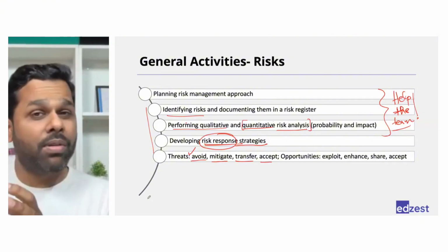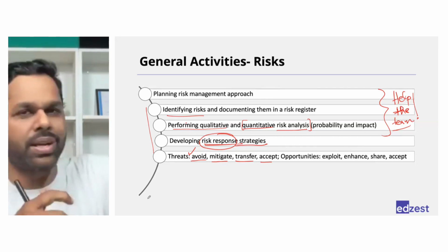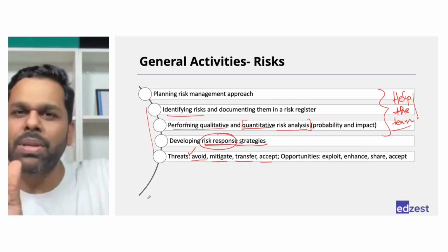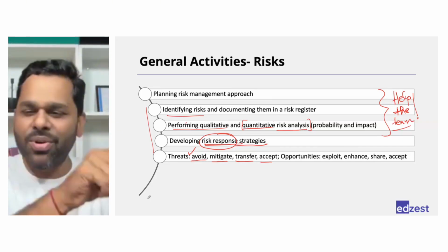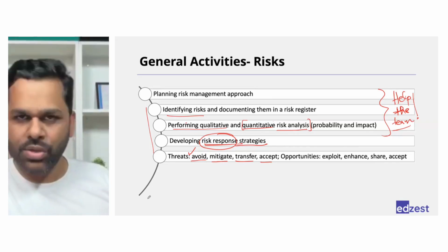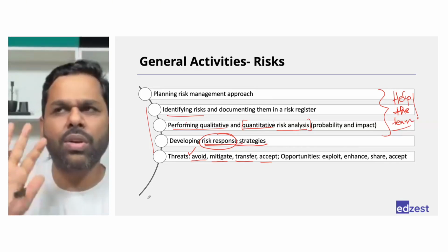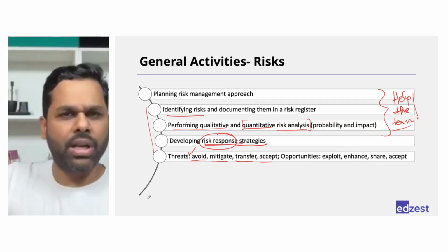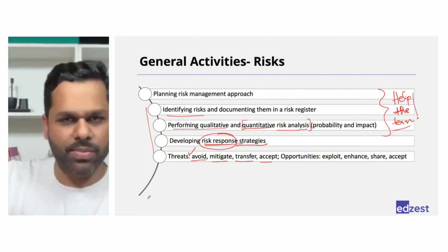Right? Now, for that problem, you are not going to spend hours in a meeting room with 20 general managers trying to figure out what could be the solution. Because the problem is 15 minutes, your solution would be 15 days. Right? So your solution will be more costly than the problem. So all those problems, which are very small problems, right? You say that, okay, we'll keep a contingency reserve for all these problems, 20, 30, 40, whatever we have identified. Problems means risk. Anticipated problems means risks.